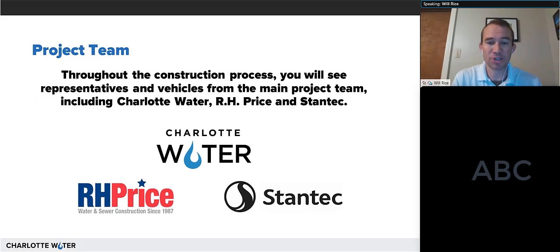So this is a special kind of project that we're doing. It's called a design build project. So we have our contractor and our consultant all working together as a single team, along with our Charlotte Water staff, to build this new pipeline. Because of its complexity and degree of difficulty in its location, we went with this method, a little bit more collaborative, to help us identify obstacles and overcome them a little bit better. So we understand this project's going to be difficult for everyone involved, including the public, and so that's why we decided to do this slightly different method of building this project to try to hopefully overcome any problems and other challenges we know we're going to encounter.